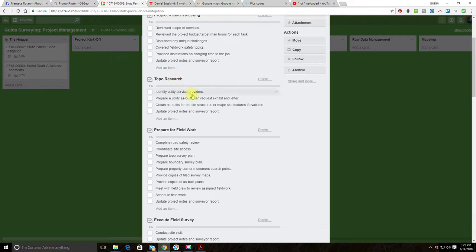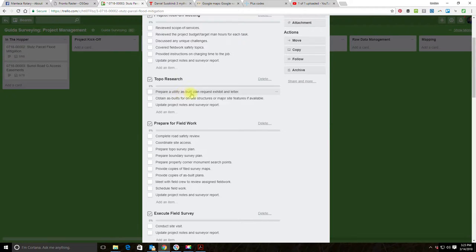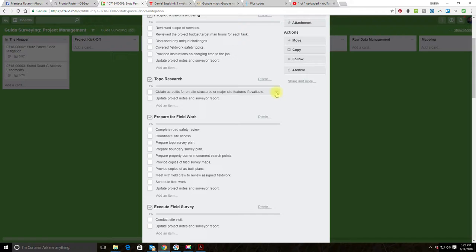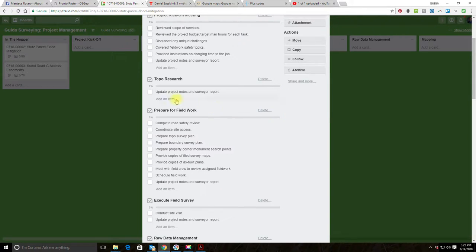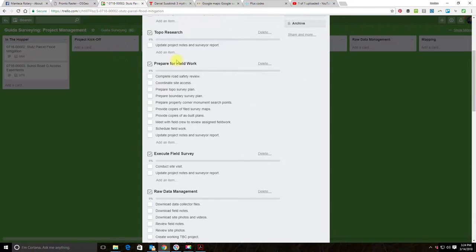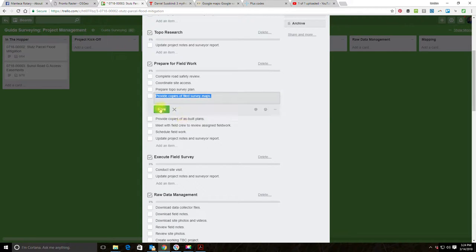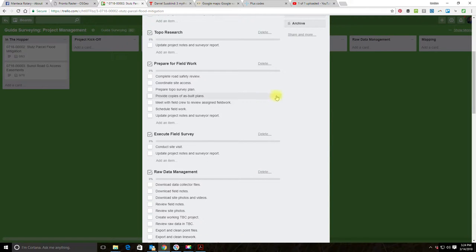The topo research checklist has some items we don't need for this fairly simple preliminary design scope. We're going to remove: identify utility service providers, prepare a utility as-built plan request letter, and obtain as-builts for structures — this is a residential area so there are no as-builts. We do want to keep updating project notes and the survey report. Moving to the field work checklist — we keep road safety and coordinate access, keep prepare a topo survey plan, but delete the boundary survey plan item.